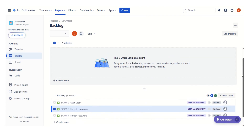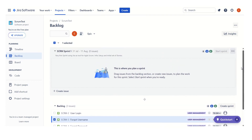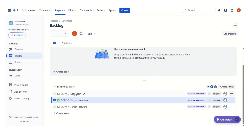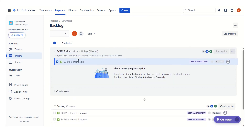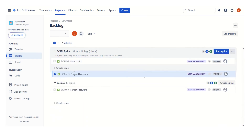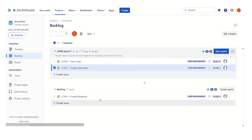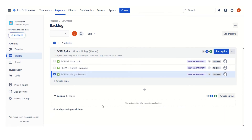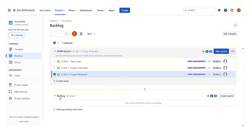All three user stories are planned for Sprint 1 based on priority. What we have to do is simply drag them to make them part of Sprint 1. We move the first user story, the second, and now the third. Whenever Sprint 1 is started, the team will have these items listed as part of their sprint backlog. This backlog view is the product backlog, and anything tagged as part of a sprint designates the sprint backlog.